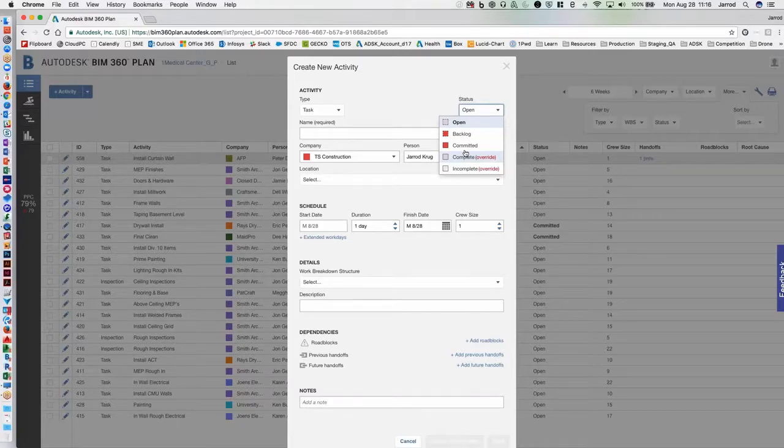And then certainly, if you want, backlog is a notion of basically parking an item, parking a task until we actually have a known home for that and a time frame. So we can actually get that in the system and then manage it once we get either resources or maybe location opened up, really all those elements combined.